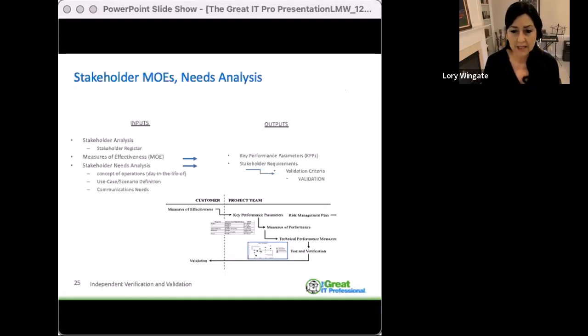What does it mean to them when they say state of the art, future, next generation? Does that mean a 100-fold increase in capability? Does it mean a 10% decrease in cost to run the facility? Those are going to be absolutely essential measures so that you can prove those measures through test, verification, and validation throughout the project.